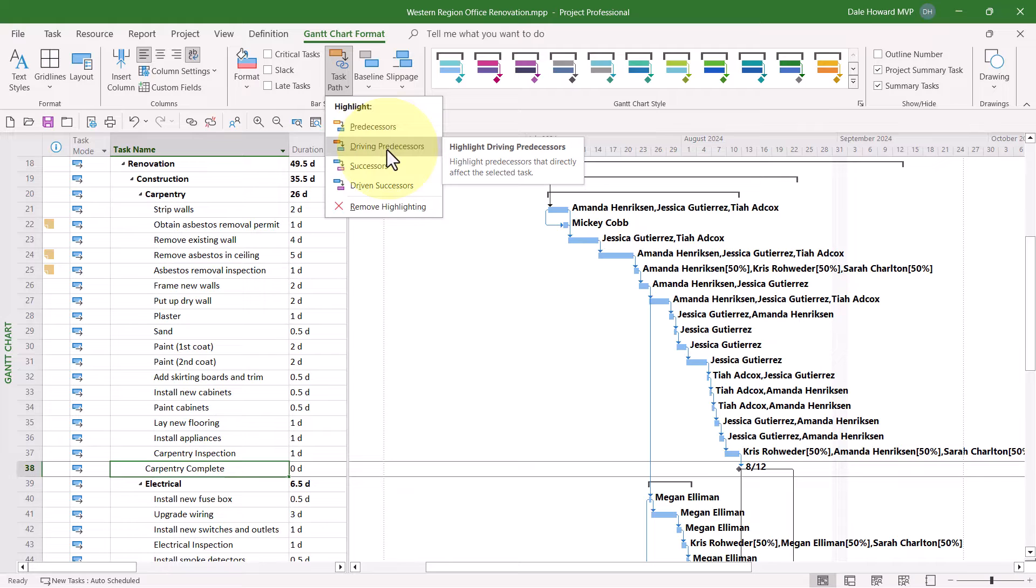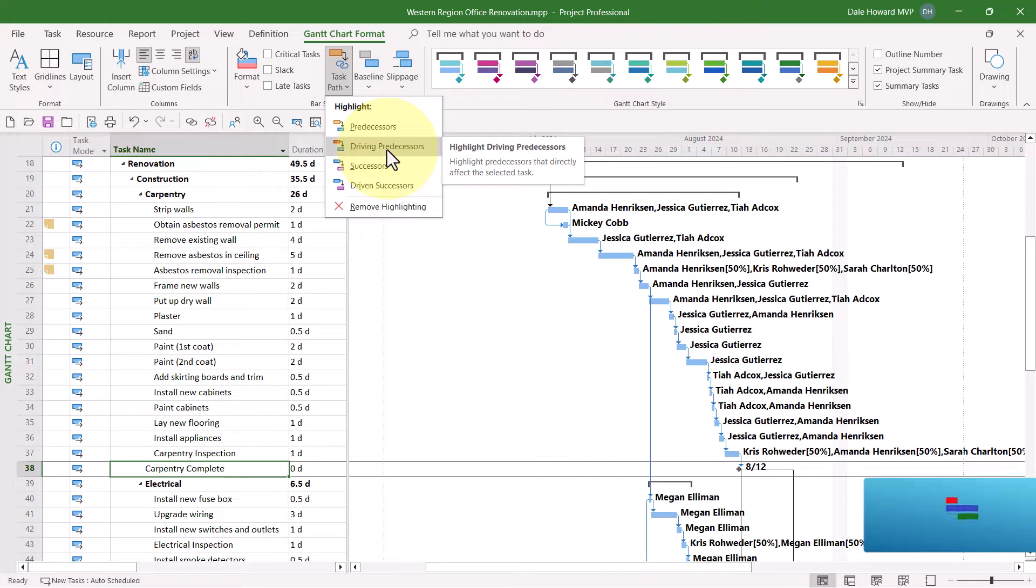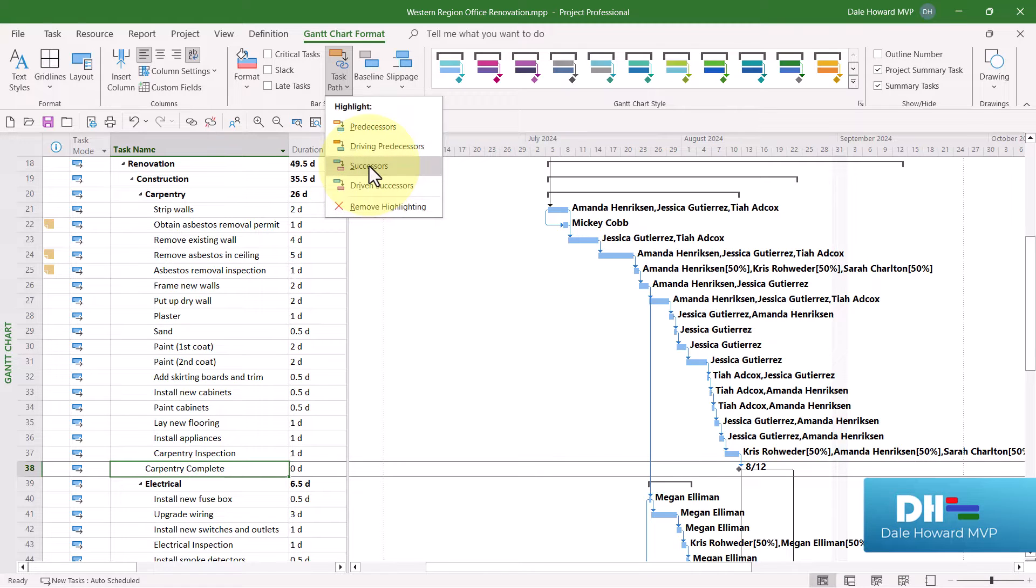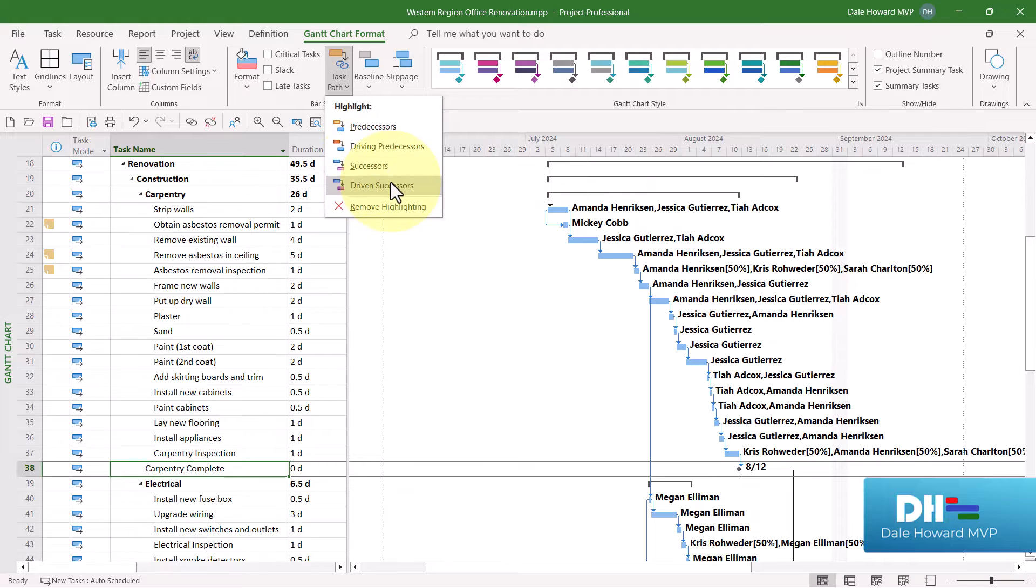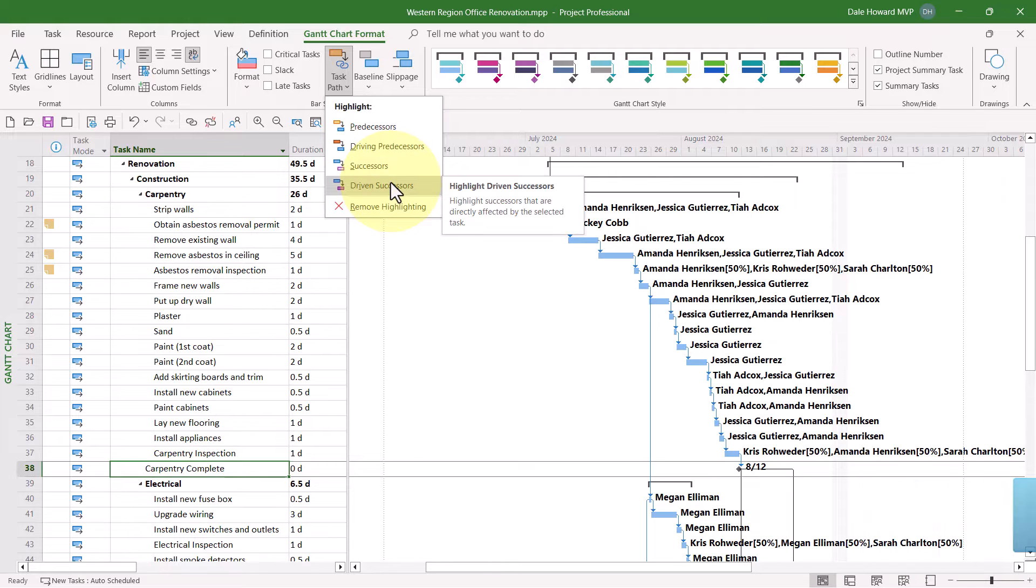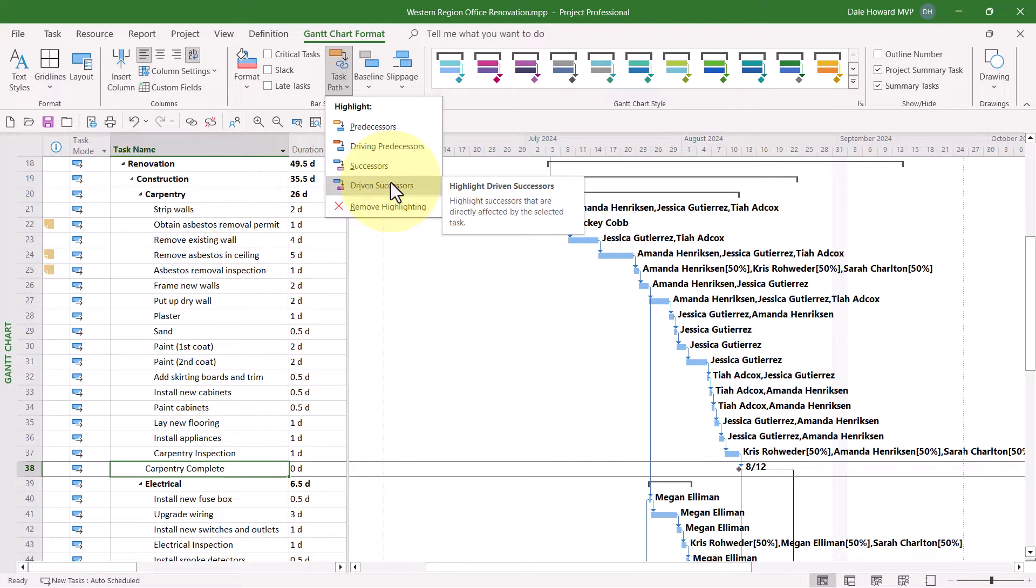Driving Predecessors, which are only the predecessors that actually control the start date of the selected task, Successors, which will be all of the successors for the selected task, and finally Driven Successors, which are only those successors whose start date is directly driven by the selected task.